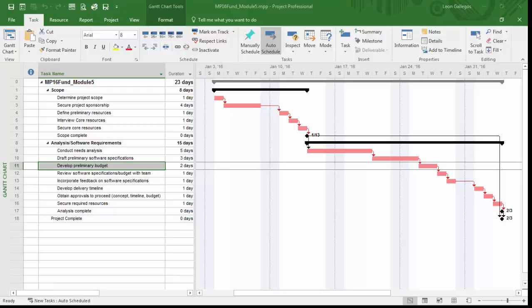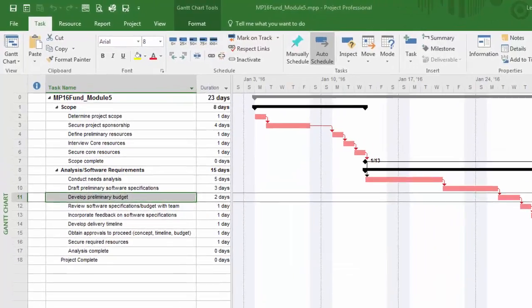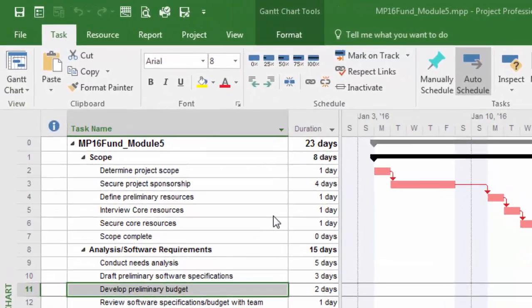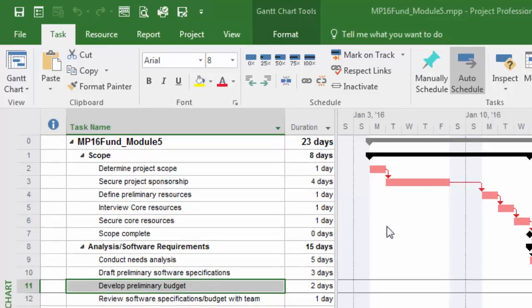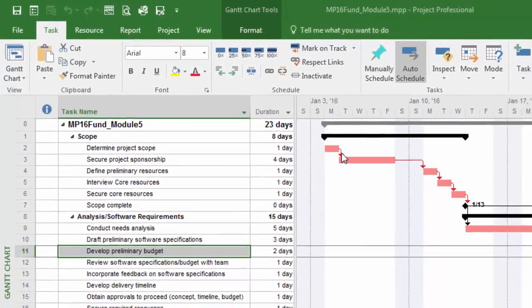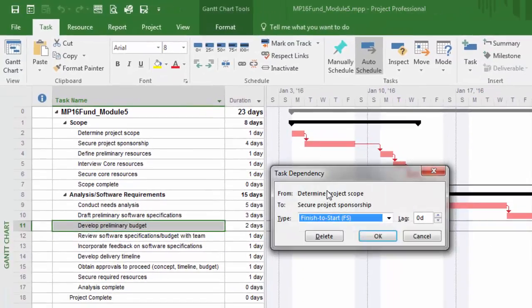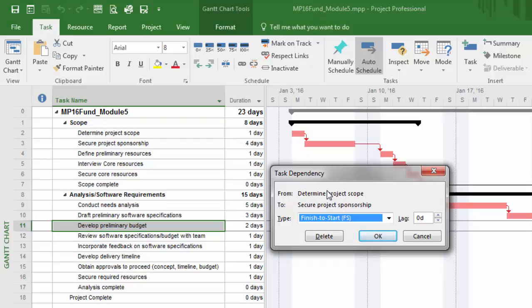Let's do that with tasks two and three. What we're saying is after we've determined the project scope, before we can secure project sponsorship, we just want a little bit of time in between. I'm going to double-click right on the join line. It'll bring up the task dependency dialog box, and you can see on the right-hand side, it has an option to put in lag time.